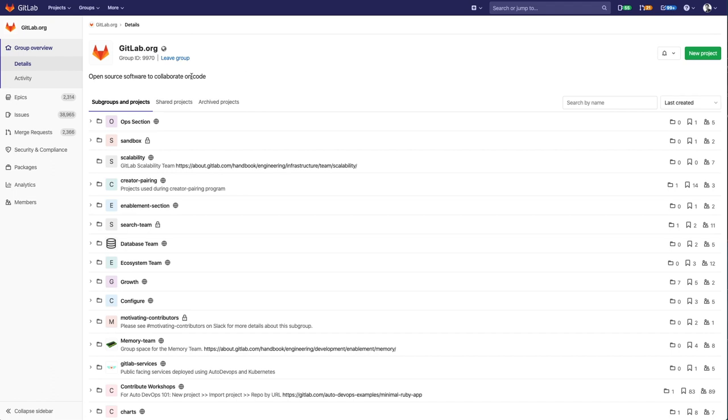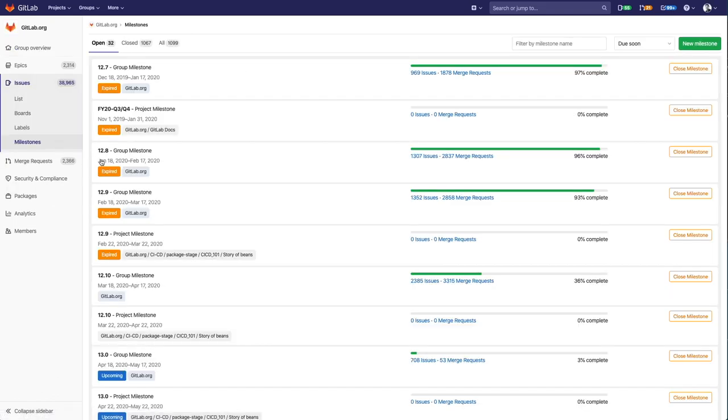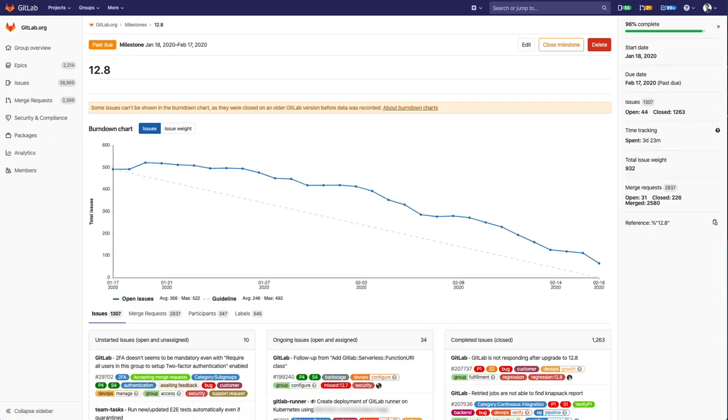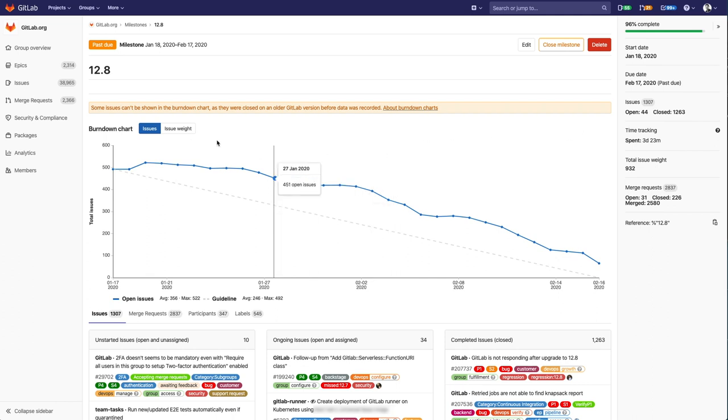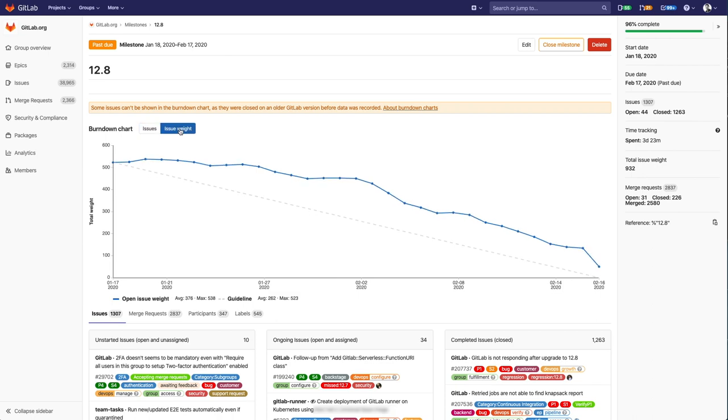Speaking of tracking work, GitLab's milestones help you to track work against certain periods of time, whether you call them sprints, releases, or quarters. Milestones enable you to track issues as they move through the development cycle. You can set optional start and due dates. And milestones provide visuals, such as burn-down charts, to help your team to improve their time estimates.